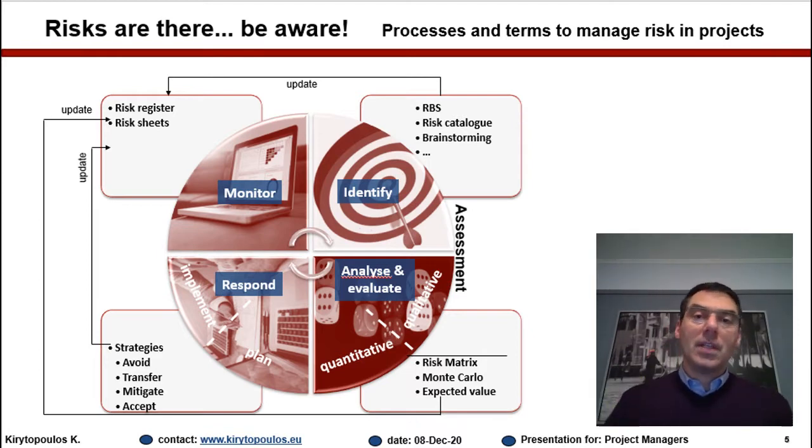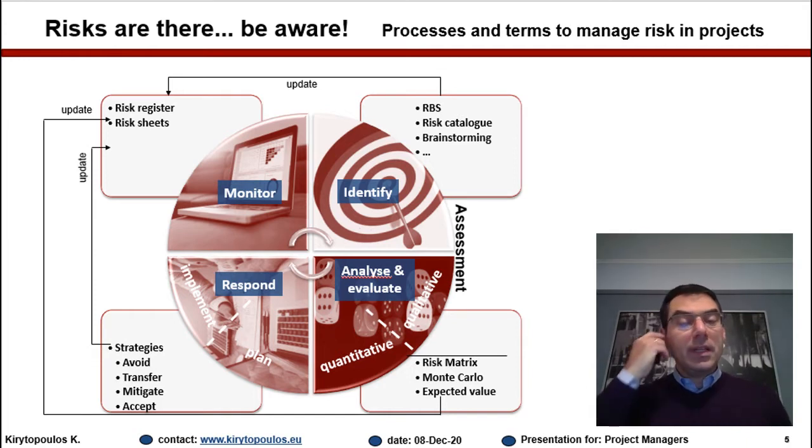But in order to go to the next step, which is the quantitative analysis, either at the individual risk level or at the overall project risk level, you need to make sure that you have good quality data. Because if you don't, then you get what we usually call garbage in, garbage out. You need to be very careful in making sure that you can trust your data, because there is a very well-known bias, which is hanging onto the results of a software and believing that what you get there is the absolute truth.